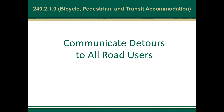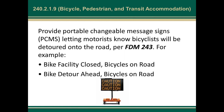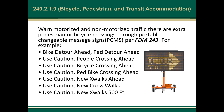We also want to communicate detours to all road users. Provide portable changeable message signs letting motorists know bicyclists will be detoured onto the road, per FDM 243 — for example: 'bicycle facility closed,' 'bicycles on road,' 'bike detour ahead,' 'bicycles on road.' We may also want to provide extra communication if there are going to be additional crossings — providing portable changeable message signs to let folks know there would be extra pedestrian or bicycle crossings, with some examples of what those messages might look like.